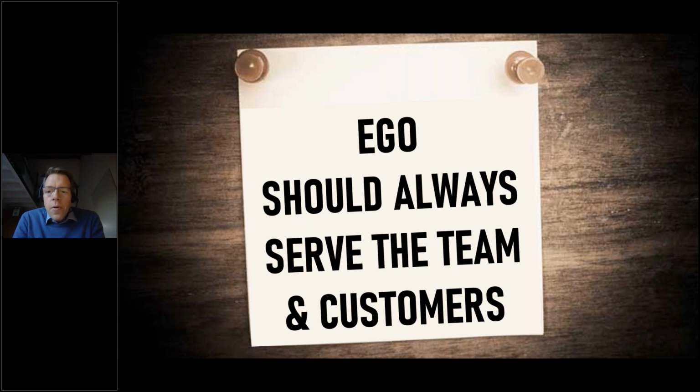So I could not change the behavior of the director, but what I could change is talk about what we will do when the director comes again asking to help out with a serious customer. And then we just created this little agreement that the product owner would be notified that the director had a bigger issue. The product owner would say to the director, well, if we put Mark on this customer, know that these will be the consequences, because the team couldn't do anything else. And then Mark would take one of the other team members with him, solving the solution.